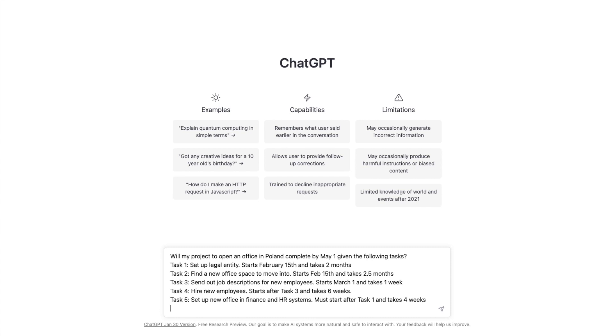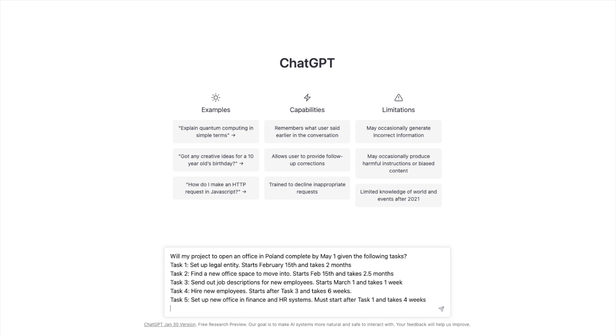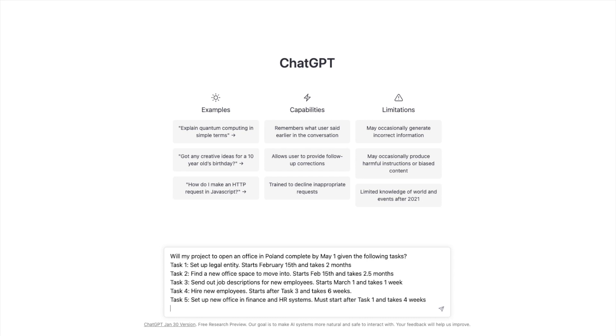Task one, we need to set up a legal entity. And I gave it some parameters. It starts on the 15th and takes two months. Task two, find a new office space to move into, also starts on the 15th and takes two and a half months. Task three, send job descriptions out to new employees. That starts March 1st and takes one week. Task four, hire new employees. Starts after task three and takes six weeks. So I built in a dependency. And task five, set up the new office and employees in the finance and HR systems to support them. That has to take place after the legal entity is set up and it takes four weeks. So I'm going to go ahead and I'm going to hit enter.